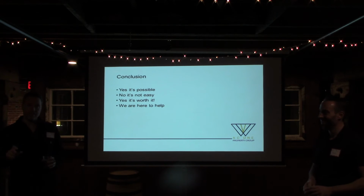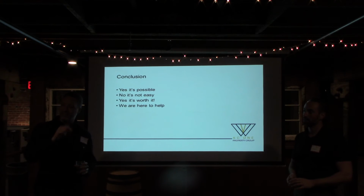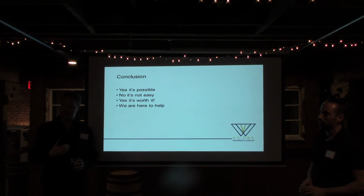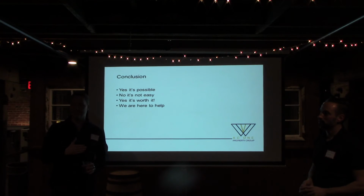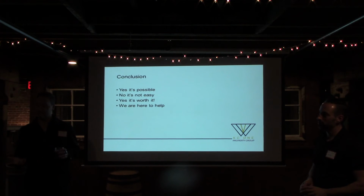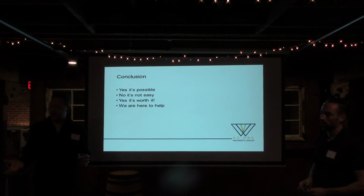Yeah, but you gotta keep in mind, that doesn't necessarily make it a bad deal. It just makes it a not as good deal as what we thought it was. Because when we run the deal analysis on all these numbers, we're plugging in worst case scenario stuff, right? So when you get a rehab back from a contractor, you put a line item in there for contingency. That's the stuff that you don't plan for, but it's gonna happen during a rehab.